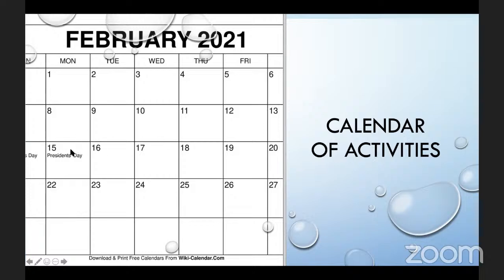So a new sprint will start if we are going with a 2-week sprint cycle. So 15th to 26th, that's going to be another sprint as well. We start with the 15th, the beginning of a new sprint, and then we go all the way to the 26th. The 26th is the end of that second sprint, and then we move on to the next sprint. So that is the idea of a 2-week sprint cycle. And some organizations have a 4-week sprint cycle. What that means is they can start from the 1st and it will end on the 26th.